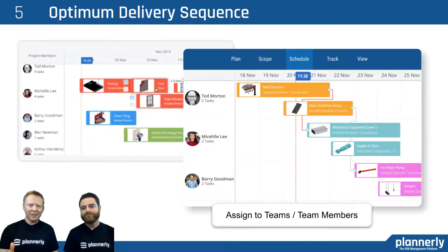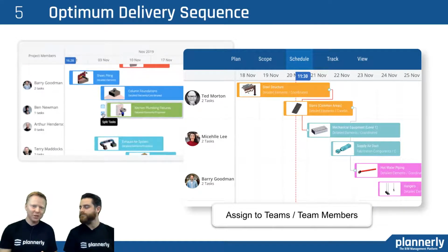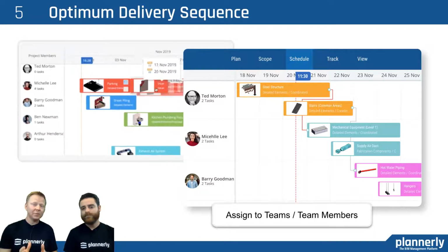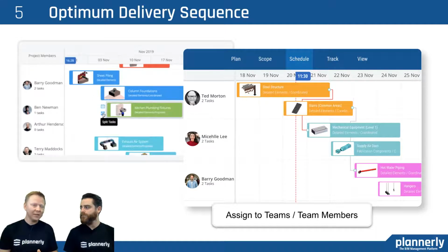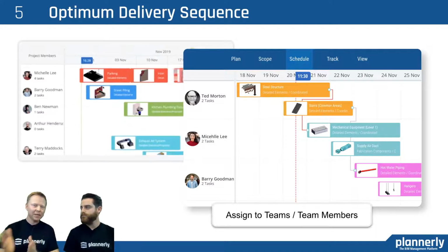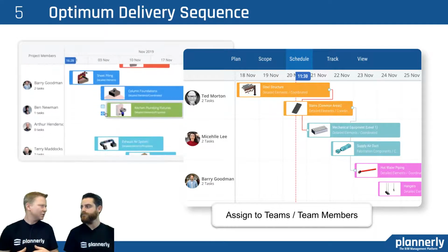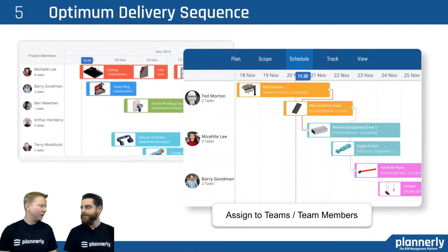Right. We've seen, and the stats are amazing, a 53% reduction in issues based on being able to sequence the tasks for each one of those information delivery milestones in an order that makes sense for the team so that there's less rework. It's an amazing ability to then not just slice it into bite-sized milestones, but also have a delivery sequence that makes sense so that you put things in place once and you don't end up moving them after you've made the decision.